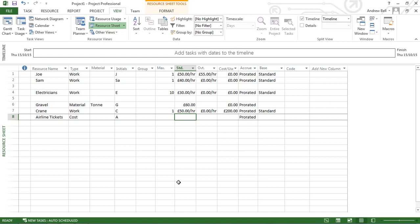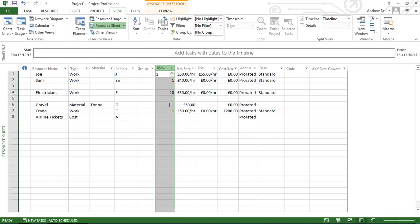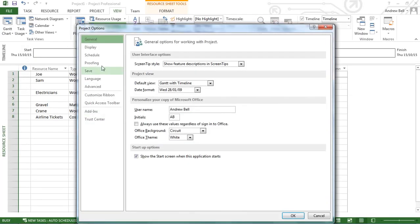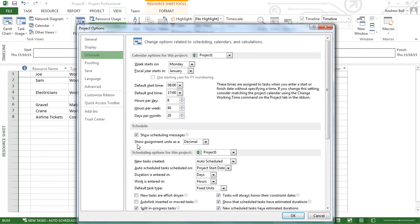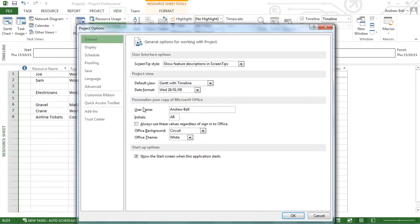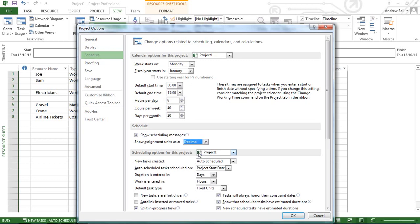The final things to look at in the resource sheet: sometimes students will say, why does this say 100% or 1,000%? This is controlled in File > Options > Schedule tab — show assignment units as decimal or percentage. I prefer decimal. 1,000% means 10 people. So I prefer File > Options > Schedule > Decimal.